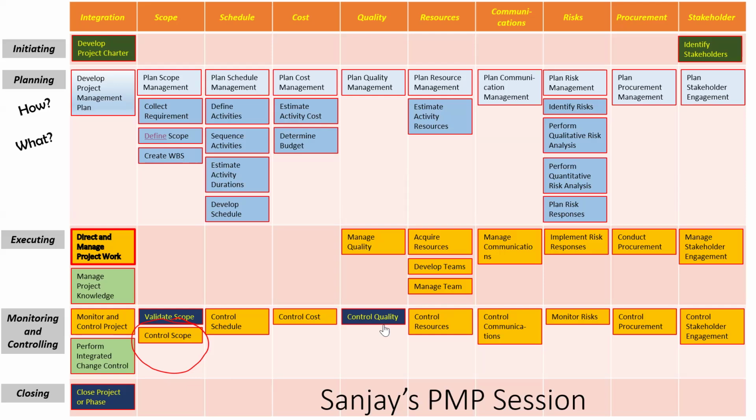You need to maintain a tracker of all the deliverables, and keep updating it on a continuous basis, saying what has been delivered, what is short delivered, and what is excess delivered, which is scope creep. Correct?